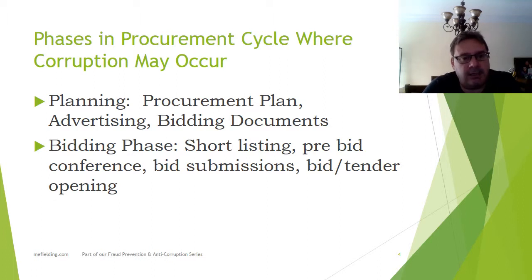So your procurement plan should be based on what you need when you need it. And the point of this document is that it's subject to scrutiny and approval when it's prepared, so that we have a collective agreement on what it is that we want. Then later in the year, if we start making purchases which are not in the plan, we should be able to provide a justification. If things are in the plan, then we're just buying what we planned to buy, and everyone agreed on that back in January. So the approval process becomes much faster and sharper. So that's this idea of a procurement plan, and we're just ensuring that what goes into it is what we need. And you do that in your review, fairly straightforward.